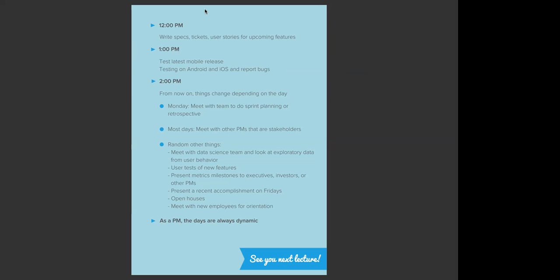So when we say it's groomed: a ticket came in saying they can't log in. What do you mean they can't log in? Which device, which platform? You have a screenshot of what needs to be fixed. You have everything pertaining to that story so that it can be considered by the team collectively during sprint planning. So you have to groom first before you plan.